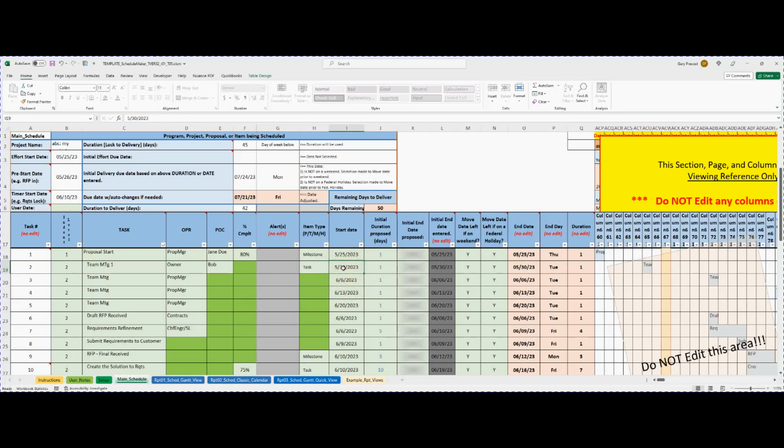you enter a formula: press the equal sign, select that date, and add plus, let's say, 3 days. Well, that seems to fall on a weekend, so instead of 3, we'll say 5. Okay, that happens to fall on a Tuesday. So now we have our first meeting date plus the difference from the meeting before.